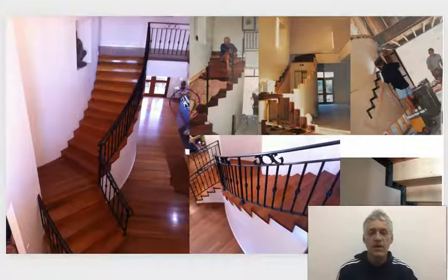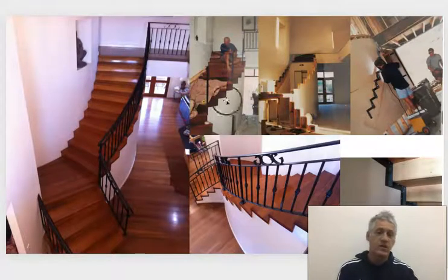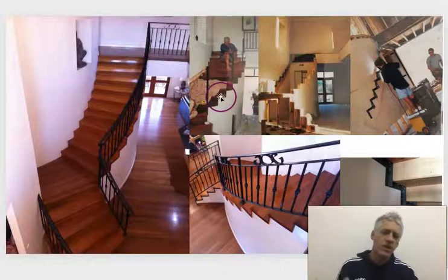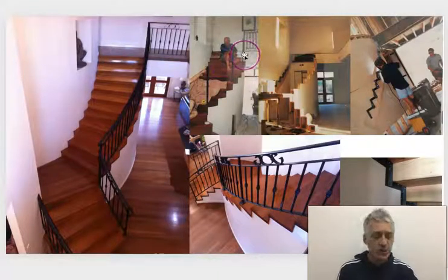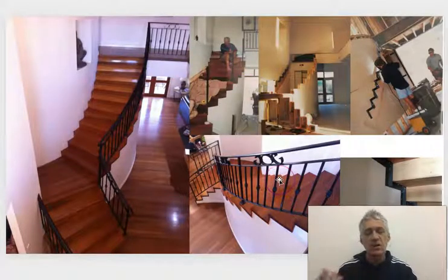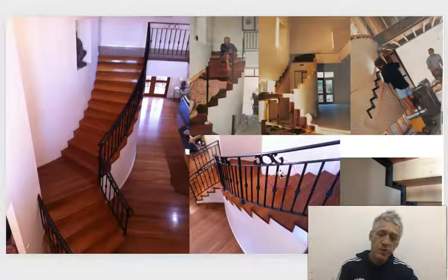Here you see my father and a friend of ours, and they're measuring things. So you need to measure and carefully adjust as you're going through the plan. This part of the staircase, the balustrading, it couldn't be constructed until the actual stairs were there. So it was built after. So you need timelines, you need to think about materials, you need to know when those materials will be needed.